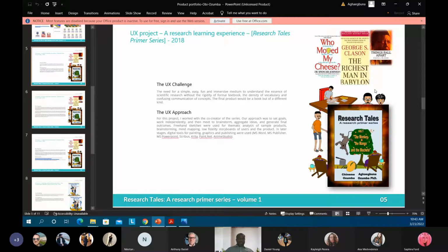What I had to do was to take time to do my stakeholder analysis, understand it, and this is from lessons I've learned before, and then look at who the key stakeholders are at each stage in this project, because I've put it down to a project with a short-term, mid-term, and long-term approach.